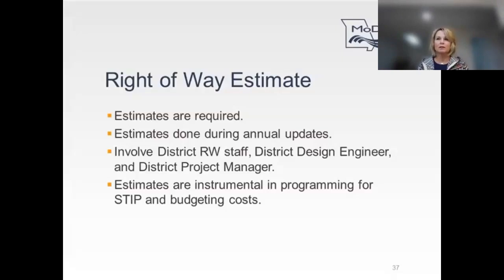Right-of-way project estimates should be updated during every annual STIP update to reflect the details associated with a more detailed scope and preliminary plan development. Also at each project development stage, which I'm going to go into. The 4 project development stages for right-of-way include planning, programming, preliminary design, and final right-of-way design. These stages serve as benchmarks along a project timeline which coincide with the right-of-way process steps.